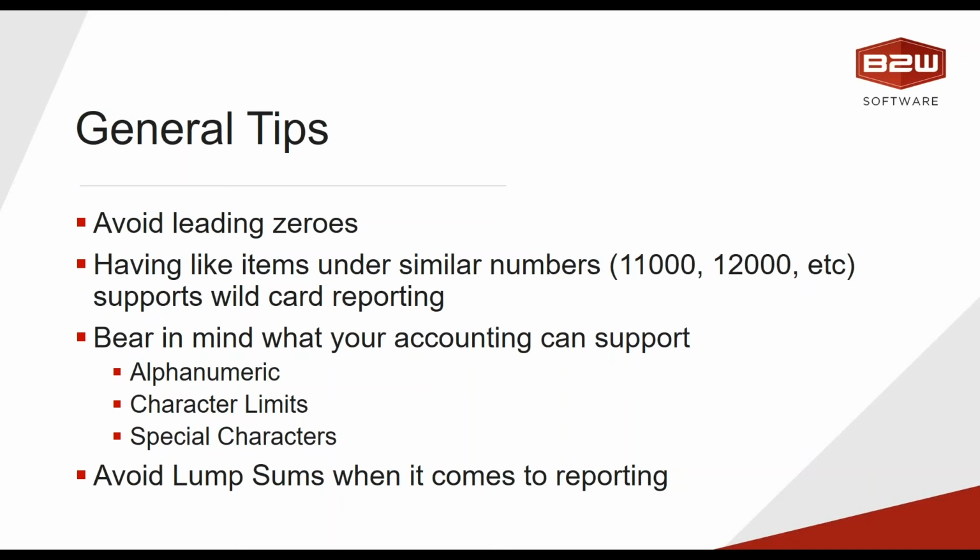And the other thing, this steps out a little bit from the idea of job cost IDs and goes into the field reporting side of it. But generally speaking, when you're setting up a job cost ID, you're also setting up a unit of measure that's associated with it, at least when we're talking about the field reporting side, which I know many of you, if you're using our products and you're concerned about job cost IDs, you're probably using B2W Track, or you're using B2W Schedule, and you're using production rates.